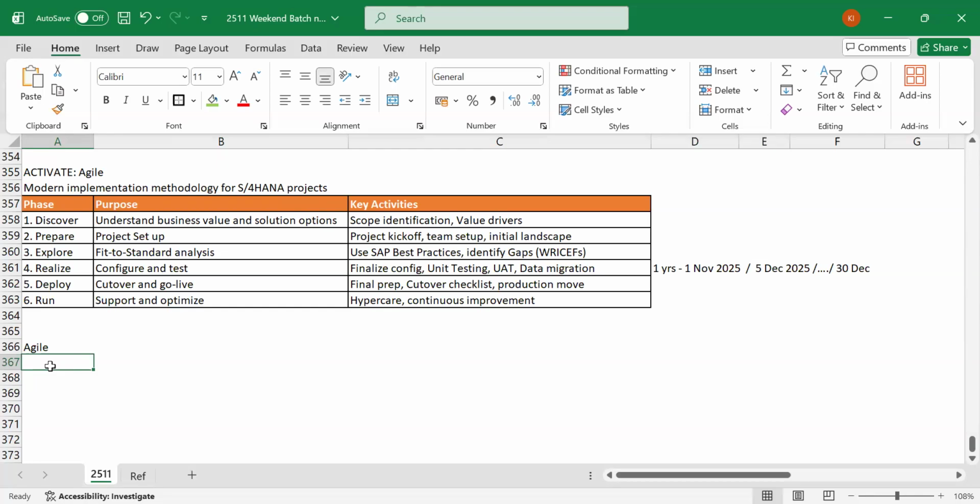But here in agile methodology, what happens? I'll focus on only one floor. Whatever you need, everything for the first floor, I'll finish first. I will not do anything for the second floor. Once you are happy and give approval, the first floor looks awesome, or the first floor looks good, but in the second floor I need some changes. Then like this, you can always make the corrections. You do the corrections, you add those learnings and do the second floor differently by taking this experience. That's what we do in Agile.